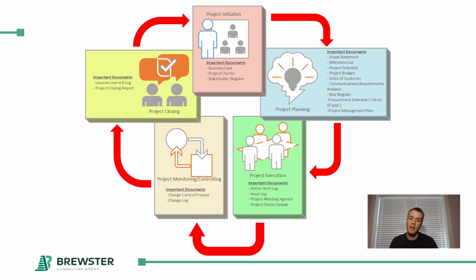Your issue log is where you actually log issues if they materialize from risks. So the issues log contains information like what the issue actually is, when it occurred, the severity of the issue, if it's kind of a mild issue, if it's kind of medium, middle of the road, or if it's absolutely critical to another milestone or an additional task that you're needing to work on. You need to make sure that you track the criticality of it so that you can prioritize what you focus